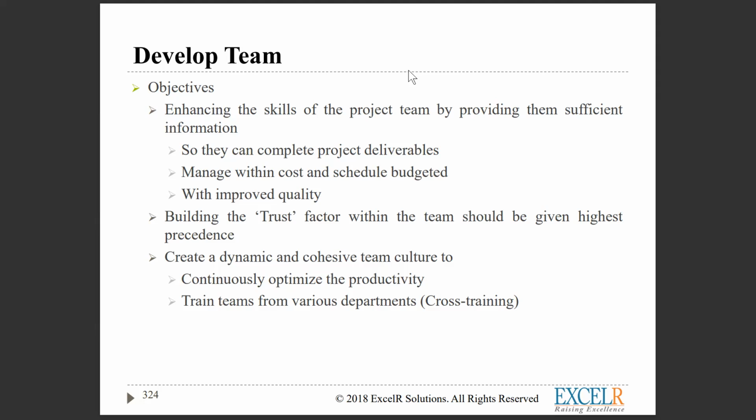which should not be, no one should be dependent on any one activity, right? As a project manager, you have to ensure that the lower the dependency rate, the higher will be the output for you. So you need to ensure that there is low dependency. That is why you need to have cross training. So what do you do for cross training? If a resource is working on module X, you add another resource, probably not full time, somewhere like 25 to 30% or 50%. So that at least, God forbid, if something happens, he goes on leave or he resigns, then the other resource can take over.